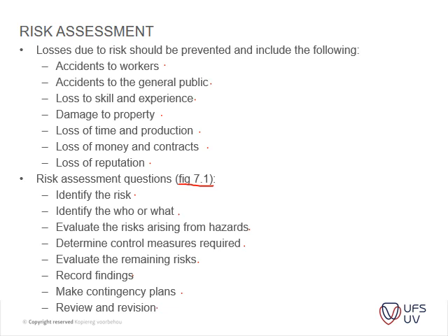Usually your health and safety consultants start with a baseline risk assessment, and each month they do an audit and they identify risks. But that doesn't mean that we as construction managers should not look at risks. For instance, some companies have ISO regulations which require you to look at your risks at least every 2 weeks, and not monthly, but that is dependent on each company.